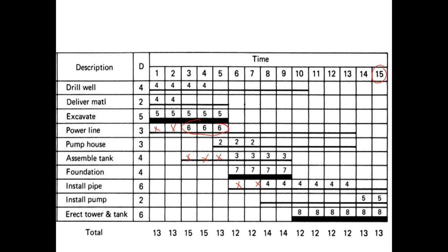And if it is, for instance, an excavation activity where you have got no float available to you, then rather than bringing 5, if you decide to bring 2 people, that would possibly double the amount of work required on excavation. So on the non-critical activities, yes, if it is possible, again, that would depend on specific project conditions. Sometimes you have got specialist workers working. So for instance, a worker brought in by a foundation subcontractor cannot be good enough to be doing the work of delivery of material. There may be different teams.